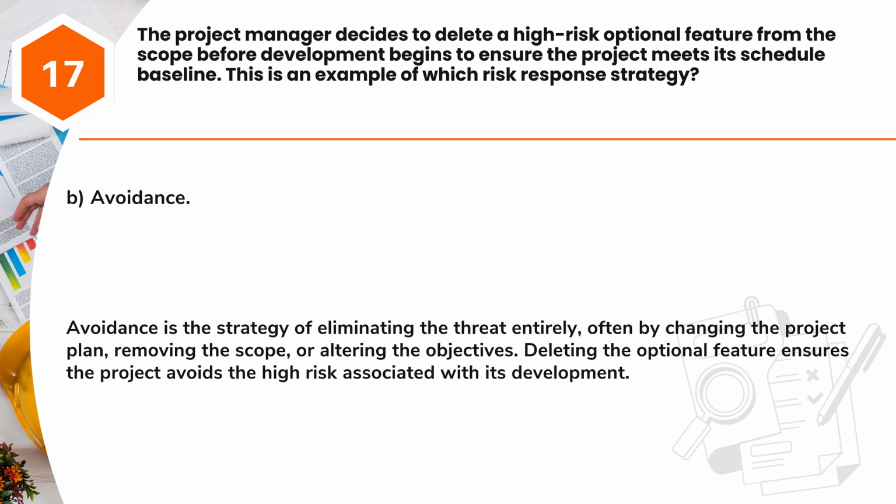Avoidance. Avoidance is the strategy of eliminating the threat entirely, often by changing the project plan, removing the scope, or altering the objectives. Deleting the optional feature ensures the project avoids the high risk associated with its development.